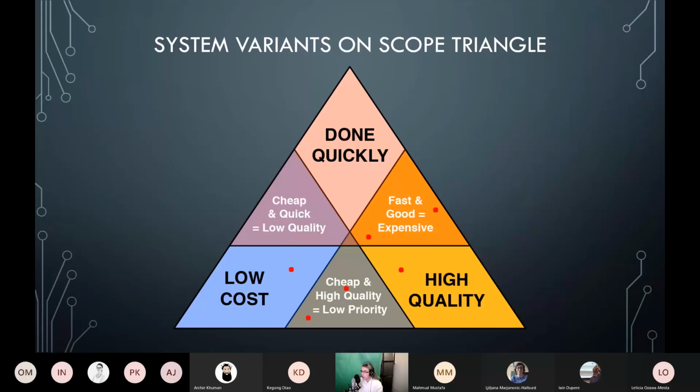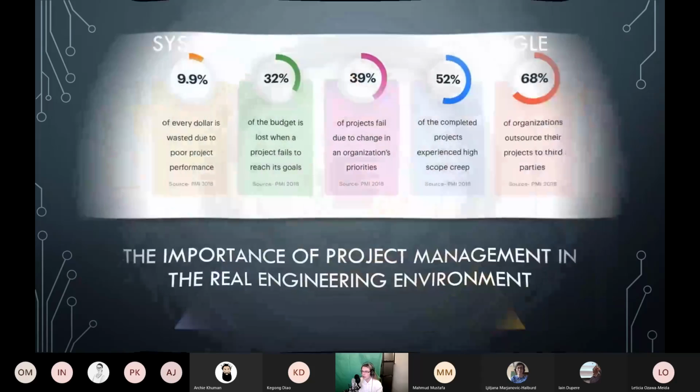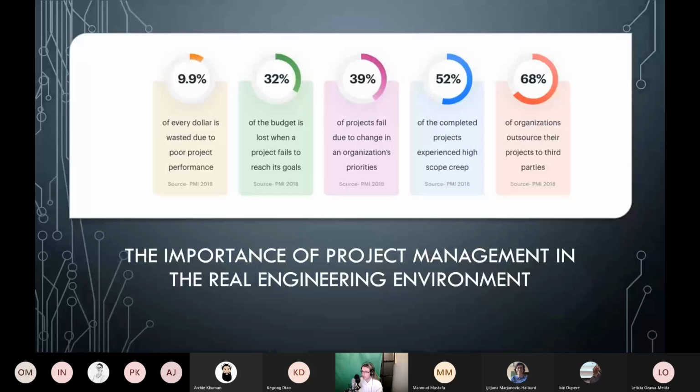There was one more lesson. The best idea is to assign people to tasks which are related to their course, if possible. In this way, they won't feel that they have to research something unrelated to their challenges they can meet in the future, and it can also help to speed up the research and design because the students already have some basic knowledge about the subject. However, we should be open to learning new things which are beyond our discipline and do our best when we research a specific topic. Eventually, I understood the importance of project management in the real engineering environment.